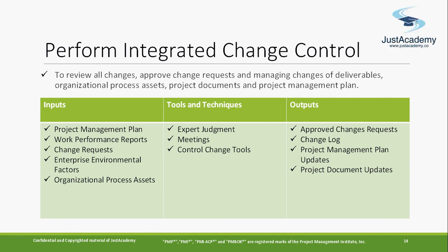They will decide whether they will take this new requirement into the project or not. Sometimes that requirement doesn't take much time itself, even 1 or 2 hours, but developers should not accept those changes on their own. It has to go through change control, and they will decide whether they want to consider it as part of the project or not.